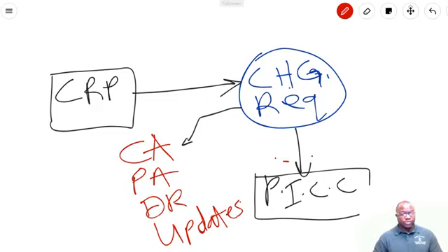They may ask the project manager for clarification, they may have their own questions, but the final verdict is going to be either an approved change request, or the change request would be put on hold or pending status till further notice, till further decisions are made, till further clarification, whatever, put on hold for whatever reason, or the change request could be rejected.